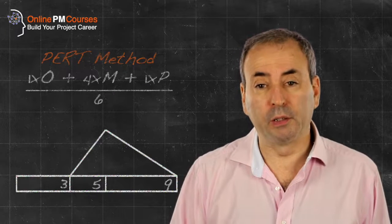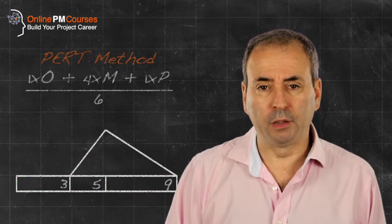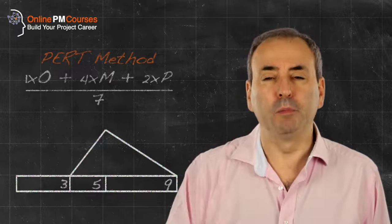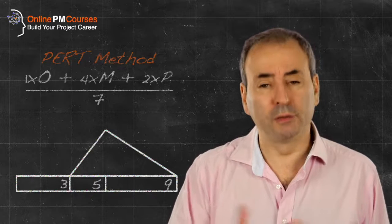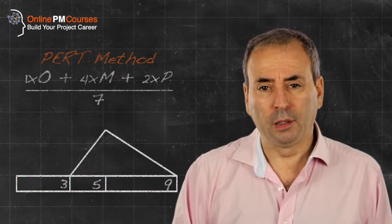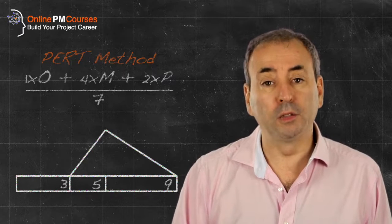That's not the only way we could do it. We could take a highly pessimistic view and multiply the optimistic by one, the most likely by four, and the pessimistic by two and divide by seven. Or we can increase the weighting on the most likely.